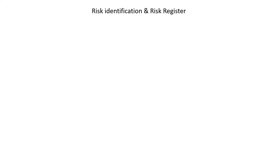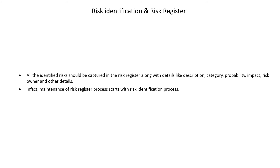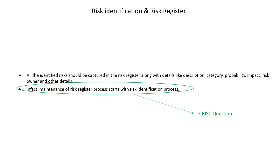Regarding risk identification and risk register: all identified risks should be captured in a centralized risk register along with relevant details like description, category, probability, impact, and other relevant details. One exam question: the maintenance of the risk register process starts with the risk identification process. Risk identification is the initial step of risk management, and the risk register should be maintained from that initial step itself.